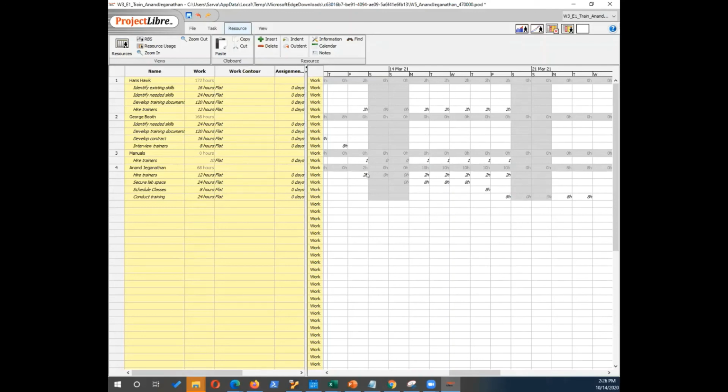But you also have a restriction that each one of you is working 50% on the task, right? So you can see that 2 hours, 2 hours. Okay, and the rest of the work is done by only you. So here, schedule lab space, schedule classes, and conduct training is allocated like this.